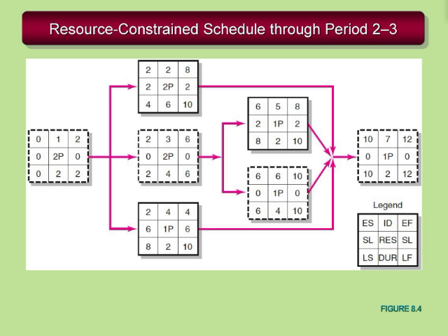Here we have a project, and we can see right now we've got 7 activities. We have a critical path at the moment that's running from activities 1 into 3, then down to 6 and back to 7. We can see that we're going to take 2 people to do activity 1, 2 persons to do activities 2 and 3, and then 1 person to do the rest of the activities. However, we're going to constrain the number of resources available to us at any given time to 3.